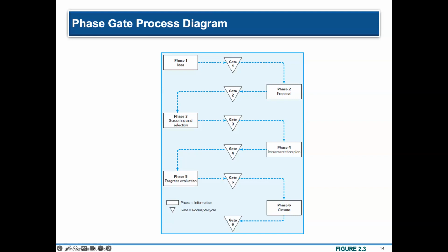Of course, when a project is implemented, you need to constantly monitor. If it's something that's still worth pursuing, then it passes through gate 5 and continues to phase 6. If it doesn't, and you detect that it doesn't at all work, then maybe at an early point in phase 5, you would have to turn off the lights on those projects entirely.